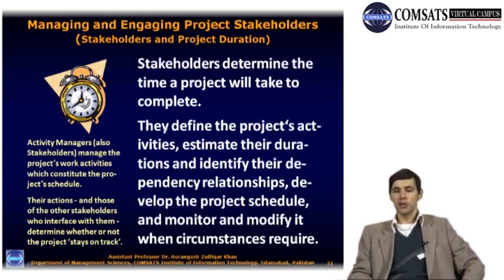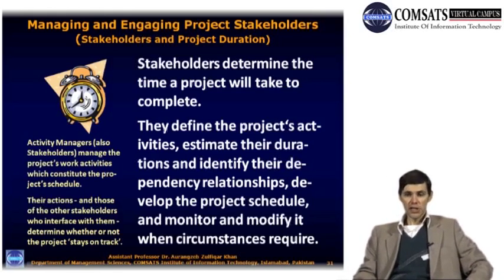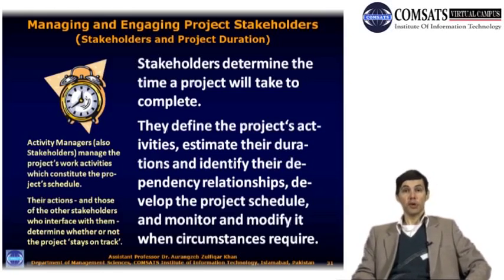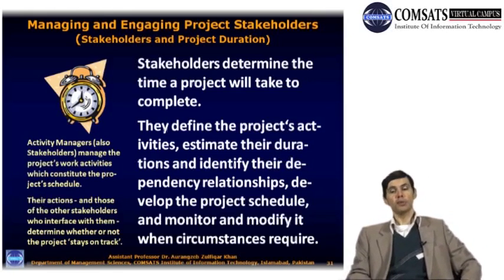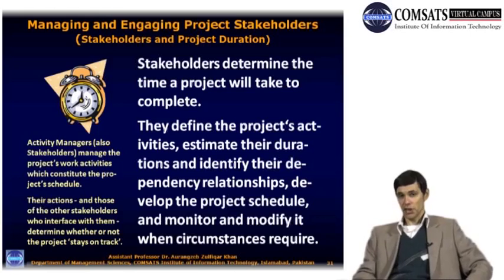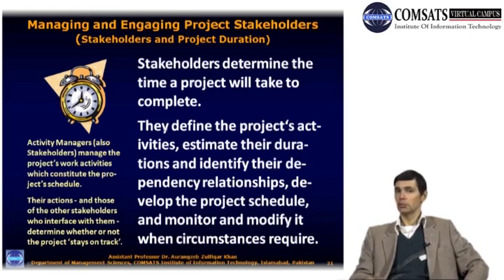They estimate the duration of the activity, how long they will take. They identify their dependency relationships. They develop the project schedule. They monitor the project schedule and they modify the project schedule when circumstances require. It's all done by stakeholders.